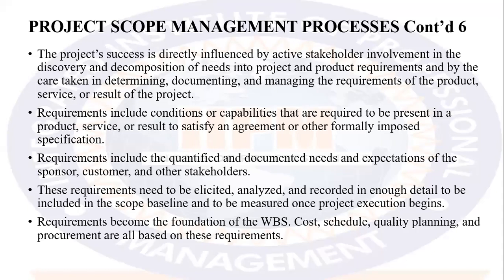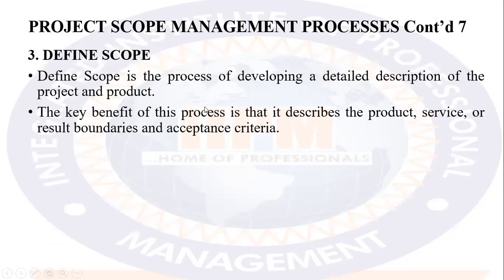So you see, from the last statement made, it simply means that collecting requirements is critical to defining what the WBS is. That's the breakdown of the activities, what they will be, what the cost, what the schedule, what the quality planning, what the procurement will all be based on. So if we don't collect the requirements right, we may end up having staggering projects, moving to and fro without having a headway. Now, after collecting requirements, you've had a series of meetings with the stakeholders just to be sure that you understand what they need.